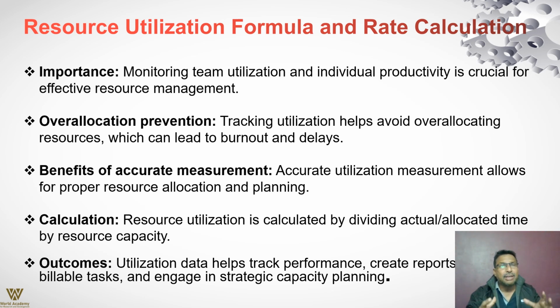Let's say the actual allocated time is 100 hours, but the resource capacity is not beyond 50 hours a week. So you require at least 2 weeks to complete the course. You cannot expect that everything will be done within a week's time. People might get confused: if it is 100 hours, how can it be done within a week? Believe me or not, you are only working for 8 hours, and you might be the only person working in that particular office. So, can you work 8 hours for 6 or 7 days? Or are you expected to work approximately 13 hours a day?